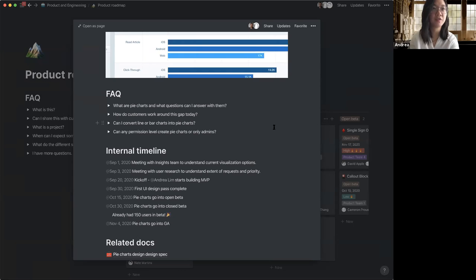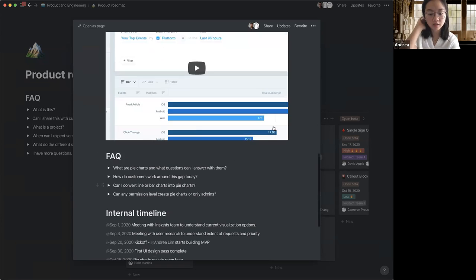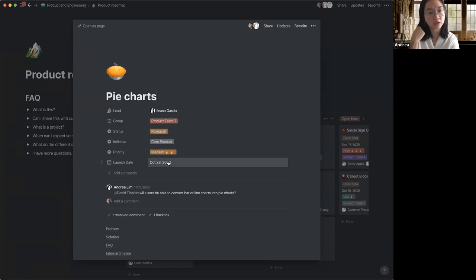Yeah, that's awesome. And if you have this roadmap and you have a deadline property, then you can just create a new timeline view, and it'll start automatically associating the Gantt chart view with that deadline. So Vishal, I hope that answers your question. You can see a month by month view of all your projects.